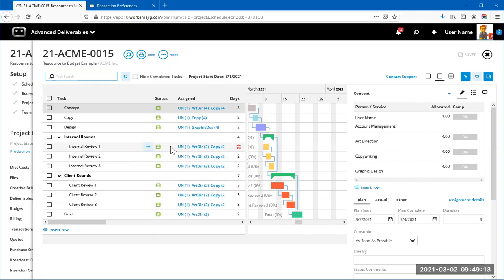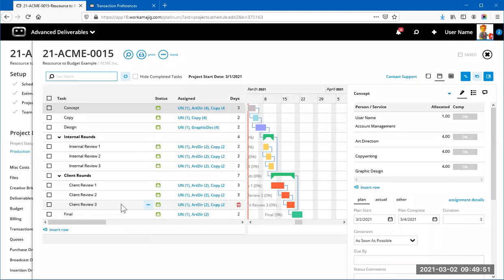This setup lets you track how much time was spent on each client round. For example, if the client came back with 20 comments on round one, you did a lot of work. Round two should be less, round three even less. If a round four is needed, you can duplicate the round three task, rename it to round four, save and refresh, and it slots in as the next predecessor task.